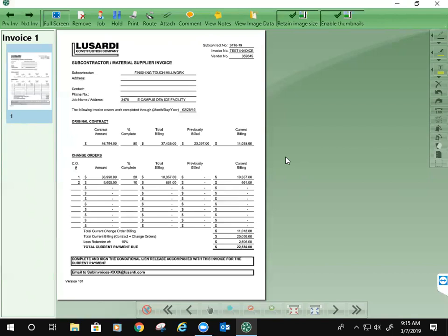A superintendent is a level 4, and you would see them as the level 4 would be the person you rejected to. We have a template, and I'll email it out to all of you so you can see who the approver is at what level. Everybody has a defined level. So like the superintendent may be level 4, they're always going to be level 4. And then the next person would be a level 5 or 6, or however you go up the line. We had to define it that way because that's how Timberscan does their ranking, by levels, not by titles.